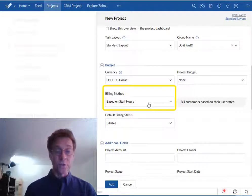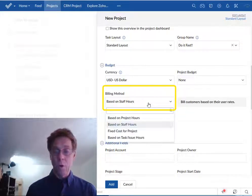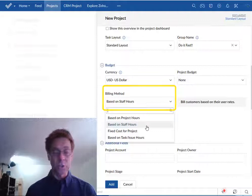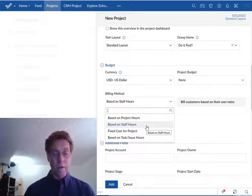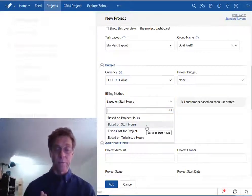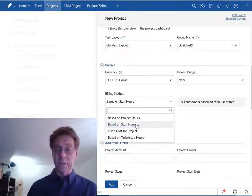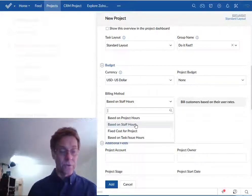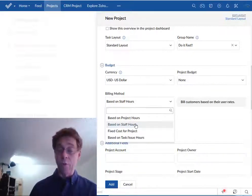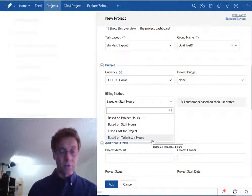Now if your team members get billed out at different rates then you'll want to take the staff hours option. If there's a flat rate for all work it'll be based on task or issue hours.